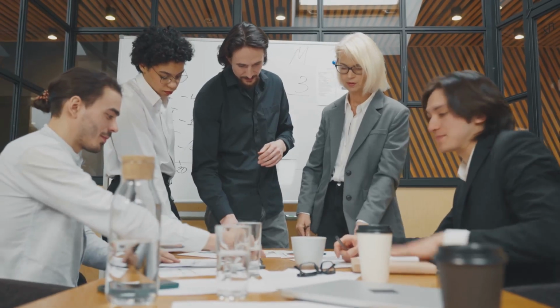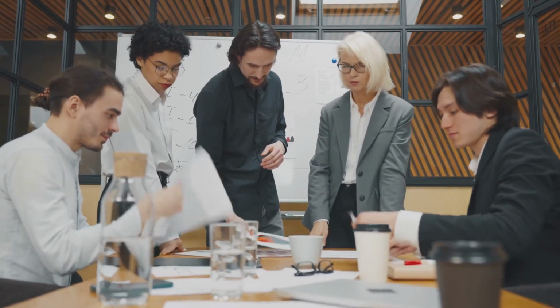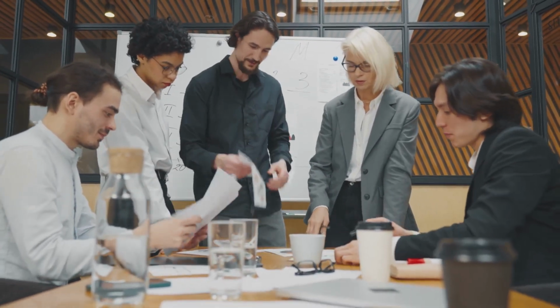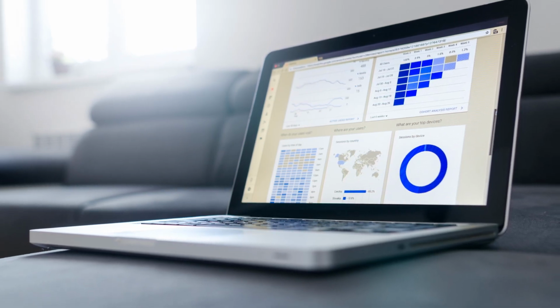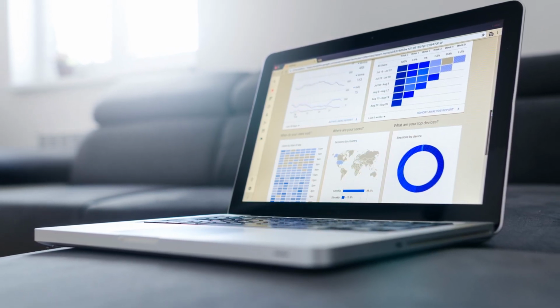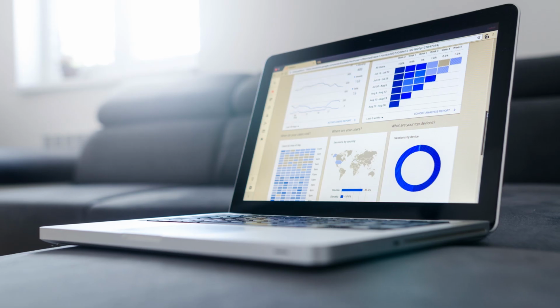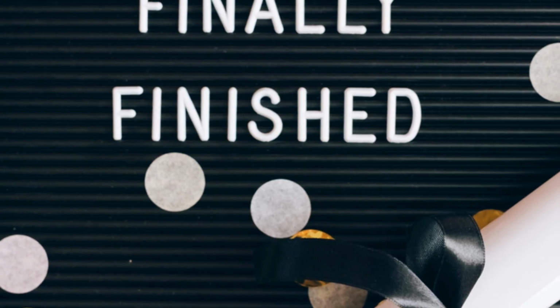A second major family is the D series, designed for the design-build delivery method. The owner defines scope and performance. The design builder overlaps design and construction to accelerate the schedule. There is a single point of responsibility.